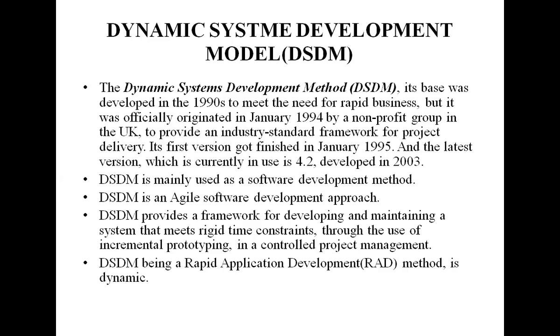And this method is particularly used for systems to be developed in a short time span and where the requirements cannot be frozen at the start of the application building. And also here DSDM works on agile development including continuous user or customer involvement. It is an iterative incremental approach